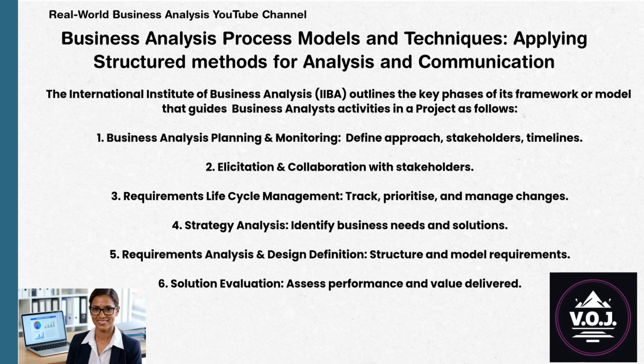And 6. Solution evaluation. This phase usually takes place after the solution has gone live and entered the post-implementation phase of the project. At this stage, the product is now part of business as usual (BAU) operations, and the business analyst evaluates how effectively the solution is performing. Typically, after a period such as 6 months of implementation, the BA carries out a performance assessment to determine whether the solution has delivered the expected business value, benefits, and objectives identified during the earlier phases of the project.